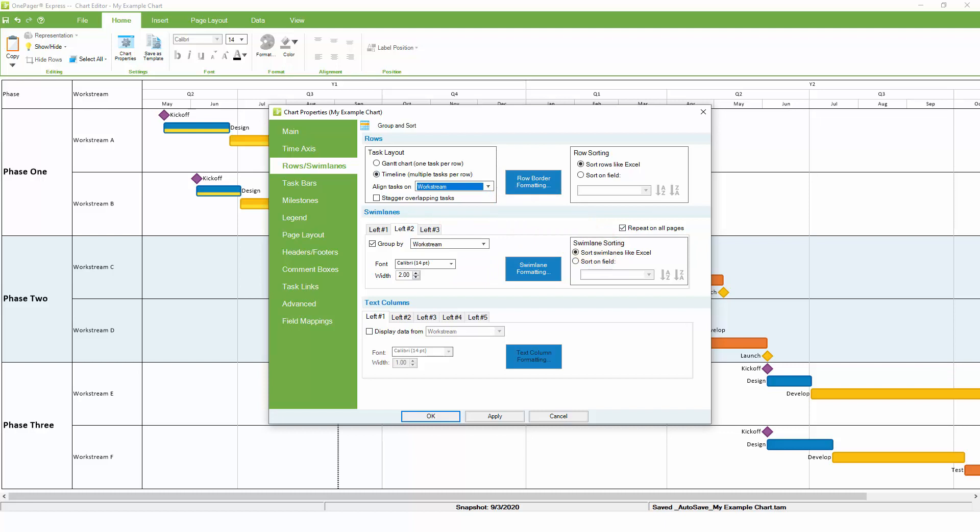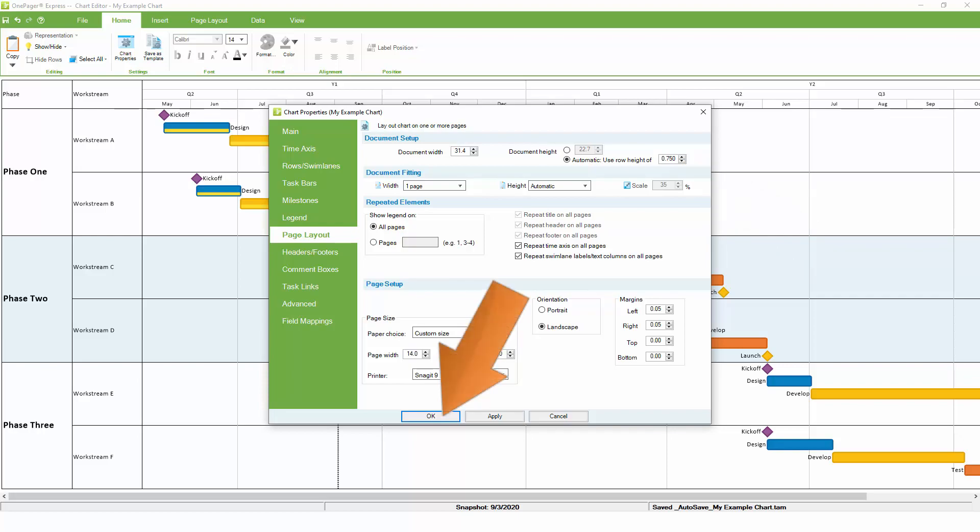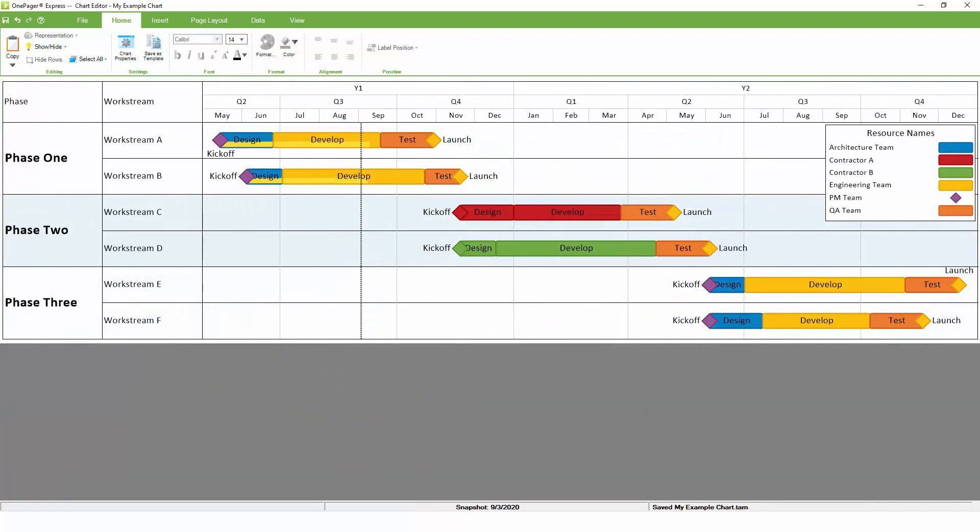Before we switch to a timeline view, let's give each row in the chart a little extra space, which will improve readability. You can do this by going to the Page Layout tab and increasing the default height of each row. With these changes made, we can click OK, and OnePager will automatically align all tasks that have the same workstream, left to right, in a single row, giving you a series of timelines for each one.